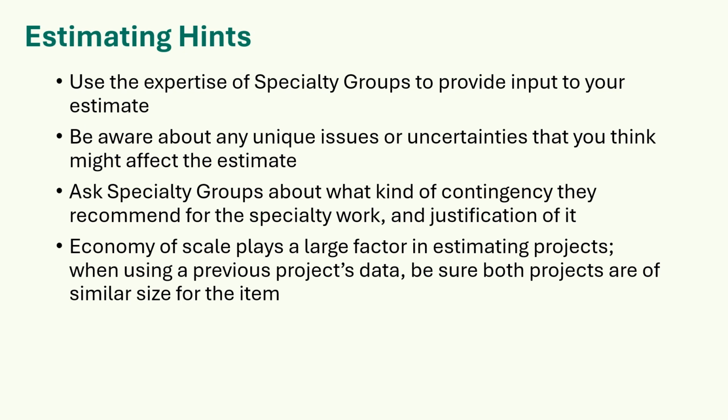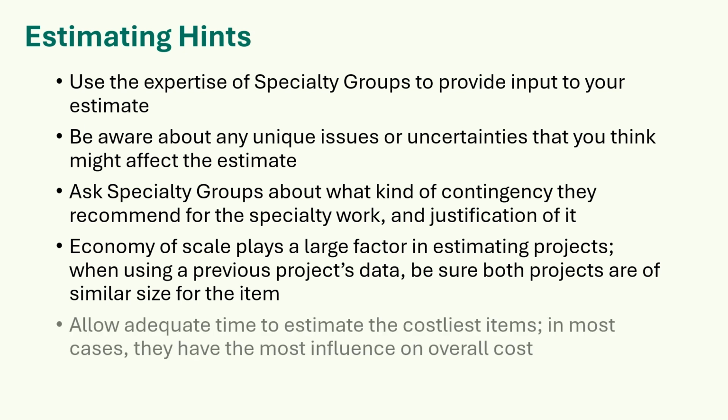When using a previous project's data, be sure both projects are of similar size for the item. Allow adequate time to estimate the costliest items. In most cases, they have the most influence on overall cost.